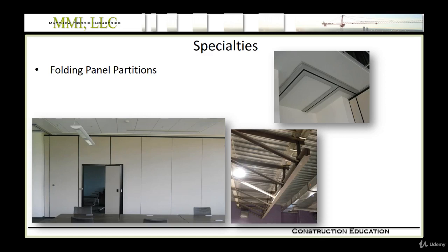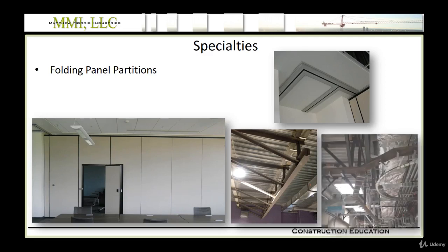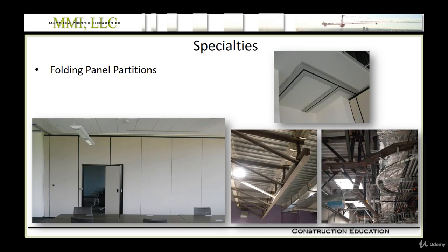Then it's time for the specialties contractor to mobilize for the first time. And you can see if you look really closely in the flange of that wide flange, there's holes drilled in it. And ultimately that's for hangers to hold the track of the future operable wall. Then it's time to install the all thread through those holes and the hangers. Ultimately the hangers will hold the track.